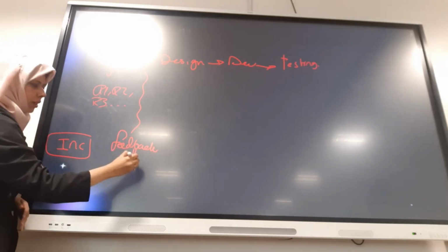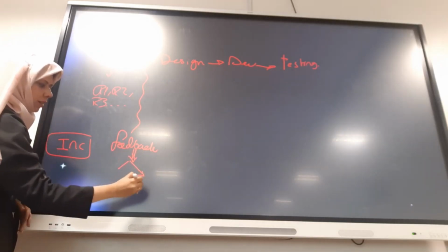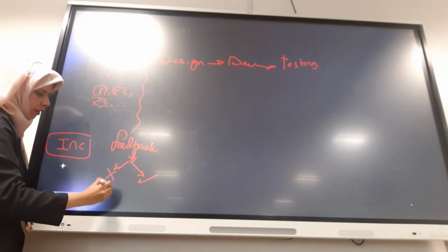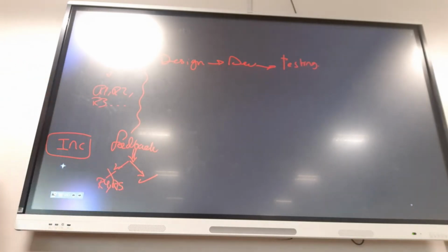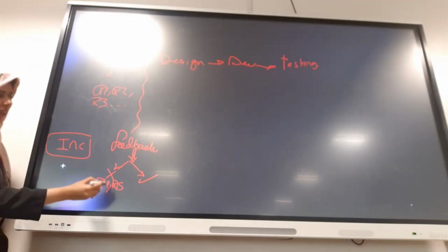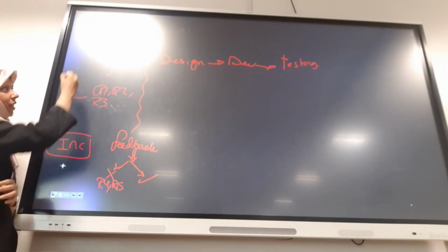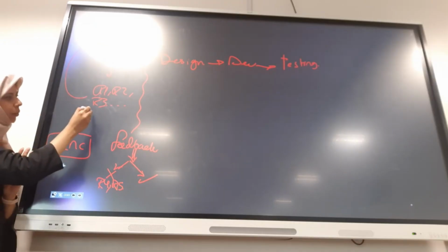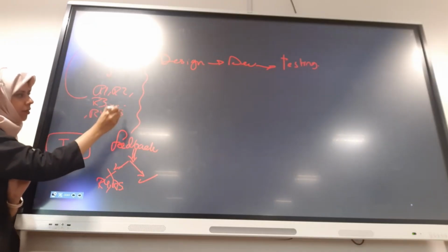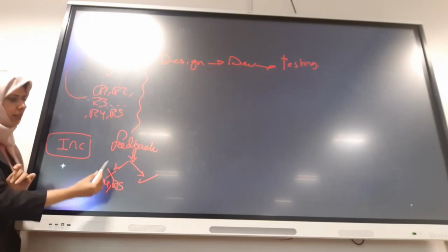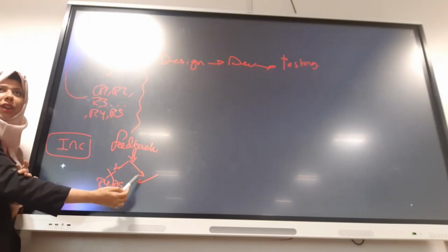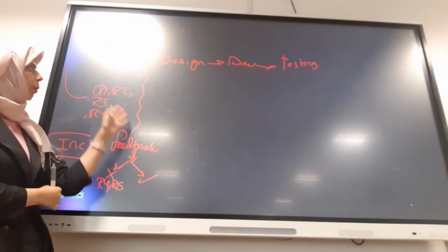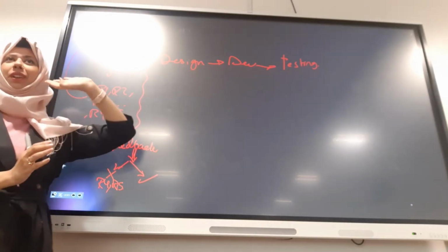Now the customer says what? Again, one of two things. You're good to go? Or, no, I request requirement 4 and requirement 5 to be added as well. And in that case, what do you do? You reiterate on requirements. Now you add to it requirement 4, requirement 5, double check again. Is that what you want? Yes, you're good to go. Okay? So only when I get the approval from the stakeholder, I'm ready to move to the second phase.